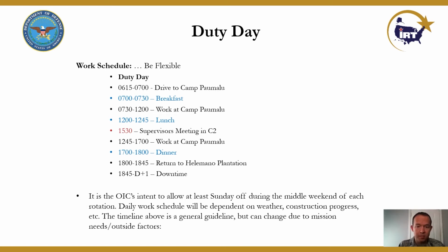And then here at the bottom, this is important as well in setting expectations. I'll quote it: it's the OSC's intent to allow at least Sunday off during the middle weekend of each rotation. And I would encourage everyone to stick to that. You don't want to promise Saturday, Sunday off and then get rained out Tuesday, Wednesday, Thursday.